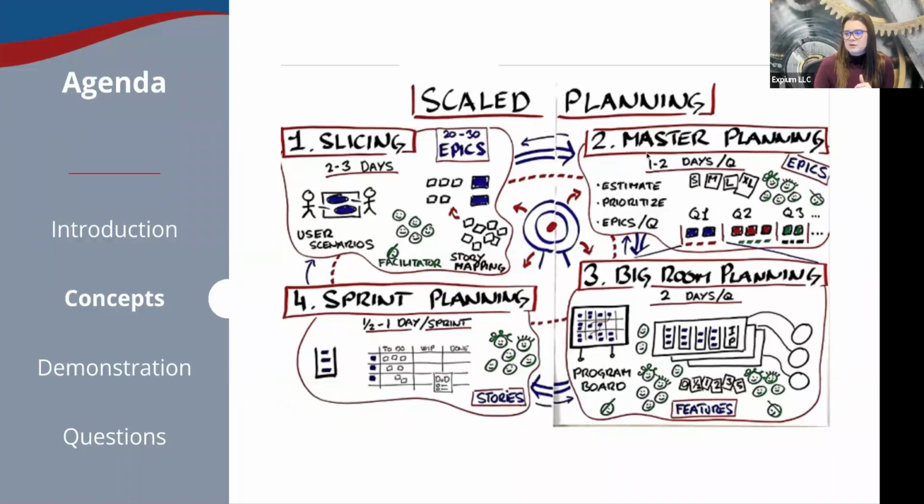We also have our portfolio level here in box 2. This is where we're working with our epics, those broader pieces of work. They last multiple program increments, maybe multiple years. We're doing things like prioritizing, pivoting, and persevering budgeting at this level. And we also have some cross slices of data when it comes to product management. We'll take a brief look at this in the tool. It's not always a piece of the tool that everyone needs, but it is there if you fall into that category.